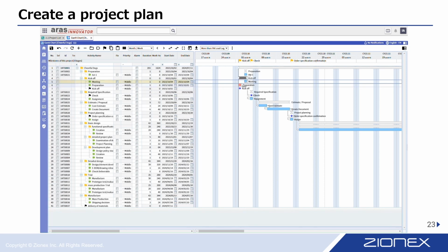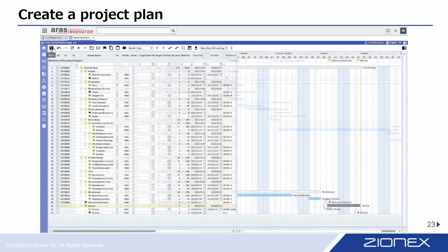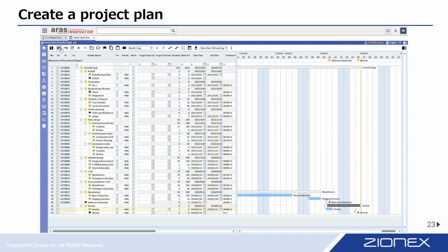In the schedule management process, adjustments can be made with ease. You can modify the timeline by either dragging the start or end date on the activity bar to change the number of days, or by simply dragging activities and milestones to reposition them within the project timeline. Furthermore, a range of essential toolbar functions is available to streamline your project management tasks.